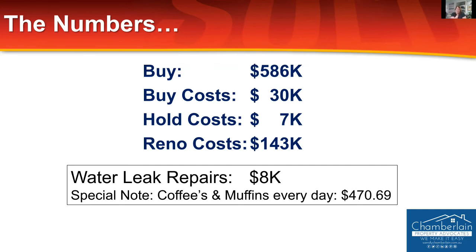Also paying immediately. Yes, pay them immediately. I'm having to follow up my trade saying, invoice me, I need to be able to pay you. Some only want to be paid right at the end. Some want half up front. They operate differently, but they like it when you're prompt. And I will tell you, they all talk to each other. They know what's going on, and they know who the good ones are and who are not as good with paying. And they'll look after you. So don't drag out payment. If you want to build the relationship, pay them immediately. Have the work be done, and there'll be a desire from their part to want to serve and support you.